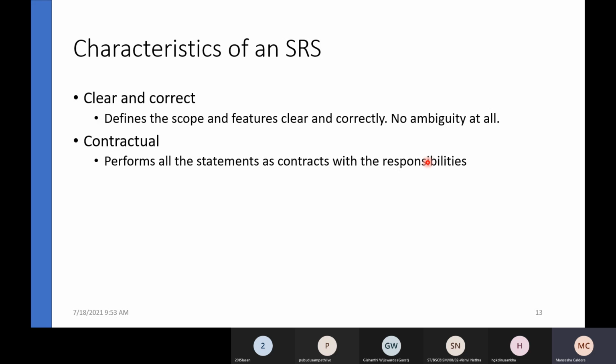As the development company, we will develop the software by 20th of May 2020, and we will keep a grace period or some time for you to test our application. And we will deliver the initial product on 20th of July. Likewise, you can tell as a development company.